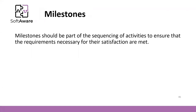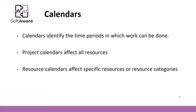Complementing the critical path, we should also define milestones and calendars. Milestones are dates where requirements must be met and goals must be achieved — they are control points put in the project to check and guarantee that everything is done up to that point. Calendars identify the time periods in which work can be done. Project calendars affect all resources, and resource calendars affect specific resources and can affect the duration of tasks. In this video, we talked about critical path, milestones, and calendars.